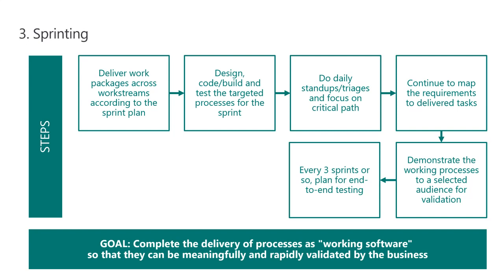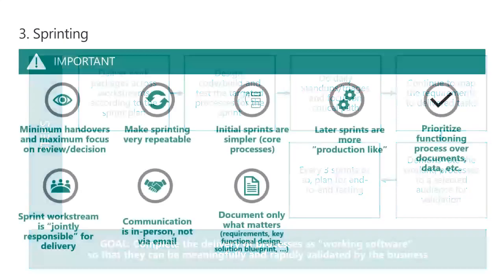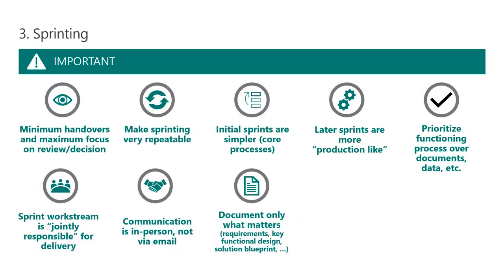And the idea behind that is you're creating the collateral, the documents and the readiness for end-to-end testing, user acceptance testing, SIT, whatever is in the scope of your testing approach. You're not having a cliff edge where you have to start writing scripts and start testing it. You're doing this as you go along. You're building up your confidence in the delivery of the software as you go along.